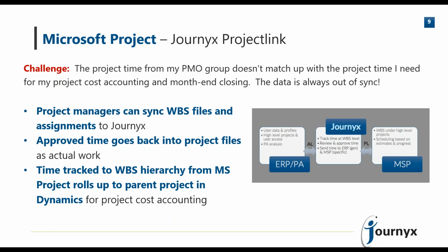That time would roll up to the parent project in the WBS, and we would feed that into Microsoft Project. But then that time would also roll up into the top level parent project that exists within Dynamics. So in a combination of our Project Link tool, which syncs Journyx with Microsoft Project, and our Account Link tool, which syncs Journyx with your Dynamics solution, we're able to tie together all of the data from Microsoft Project with all of the data from your Dynamics ERP solution, with Journyx sitting in the middle, providing that one simple solution for entering all of your time and expense data.